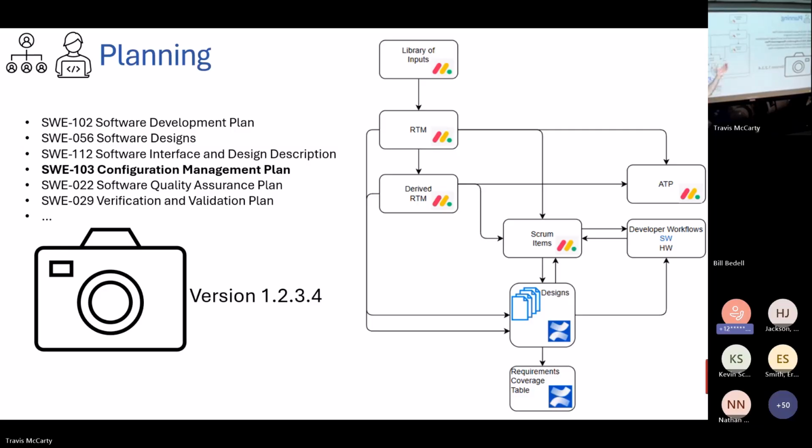It's things like, what's the plan to develop the software, your software development plan to enable your team to perform functions a particular way. For example, before you check your code into Git, you have to get a senior engineer's sign-off. That's part of your software development plan. This is the codified, agreed upon marching orders for how we do, and it's version 1.1. Okay?